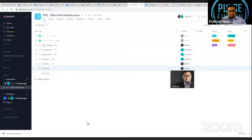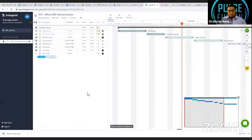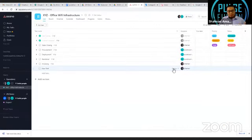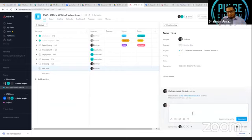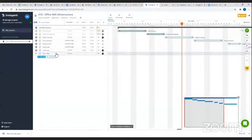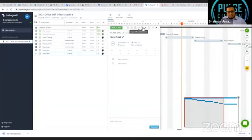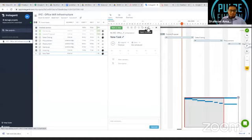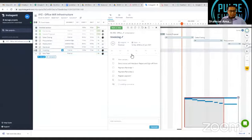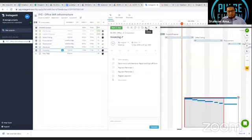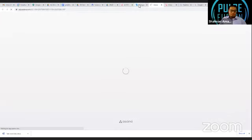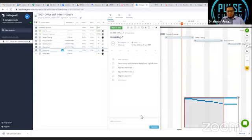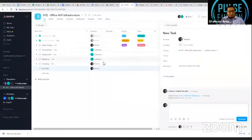The only thing you can't do in Instagantt is comments - comments can only be done within Asana itself. But you can open a task directly in Asana from Instagantt by selecting it and clicking 'Open in Asana,' which opens a new window where you can add comments.